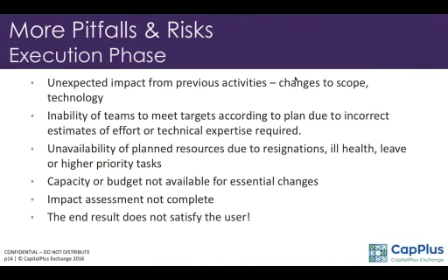Yeah, execution is a phase. There are lots of issues that crop up. Usually it's the change to the scope. Whatever has been written in the RFP gets changed here. Users will come and say, I need this, I need that calculation, I need this report and stuff like that. There have also been instances where they try to change even the technology. So these are major risks, and usually these should have been addressed initially.